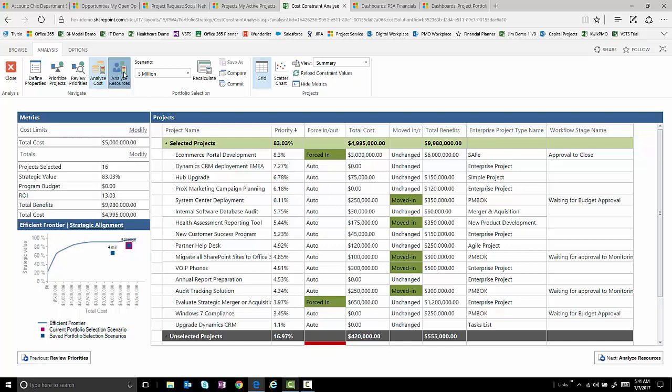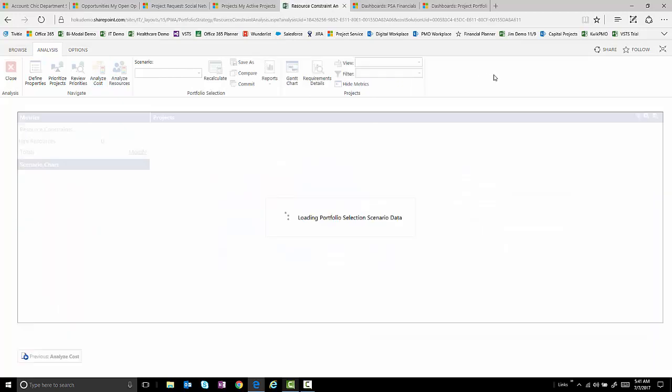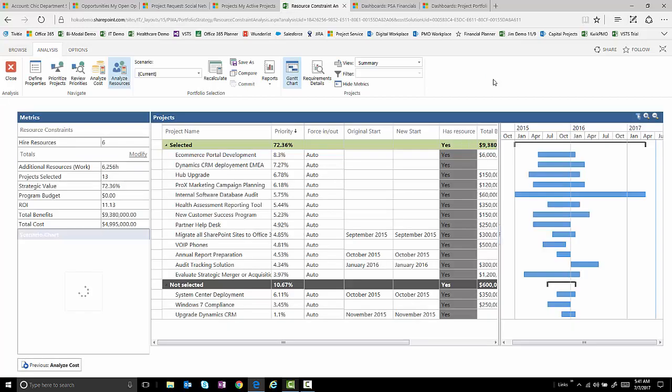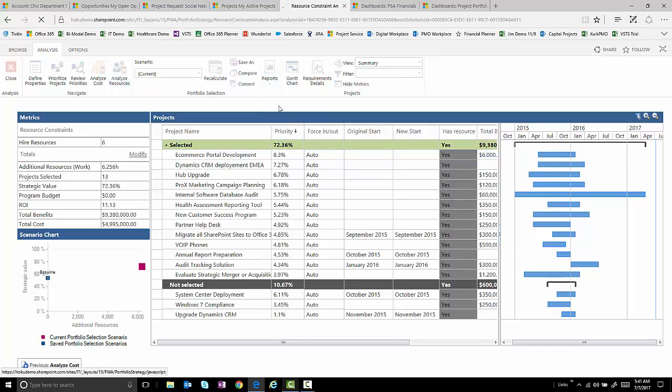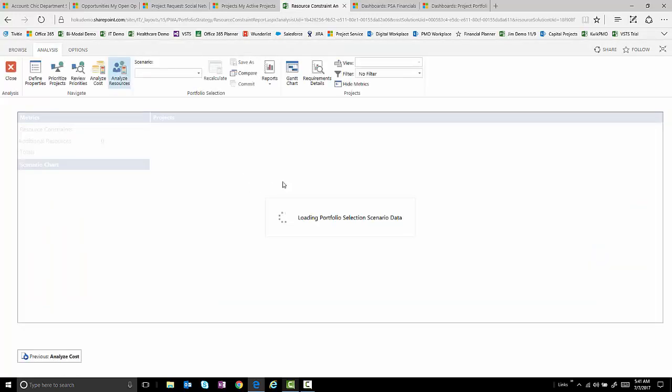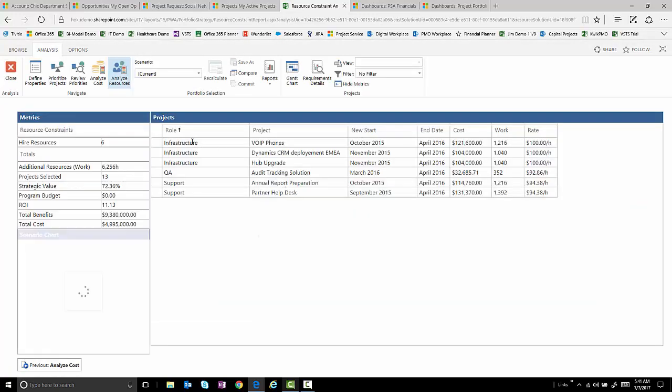We can also look at it from a resource constraint perspective and say, given the resources that we have, even though we can do 83% of the value of this portfolio from a dollar constraint perspective, it says here that even if we hire six more resources, that we can still only do 72% of this value of this portfolio based on the resource realities that we have. And this is including whether or not we even hire resources. So this gives us an idea of what type of resources we're going to need. And in this case, three infrastructure resources, a QA resource, et cetera, in order to get that 73% of the portfolio done.